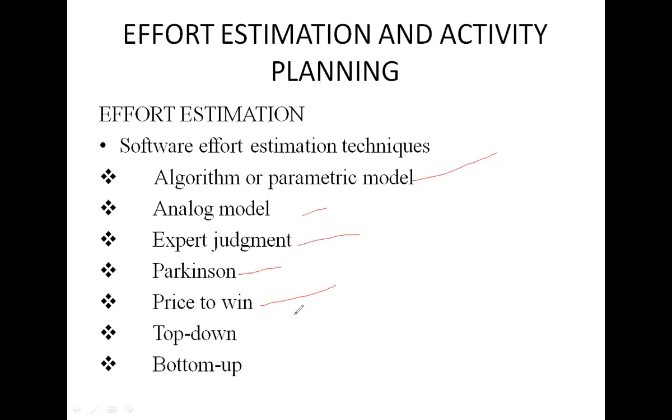Next, top-down. Here the whole project is broken down into a number of tasks and the estimation is carried out for each individual task. So you have to break down the work and carry out the estimation for each individual task. Clear?